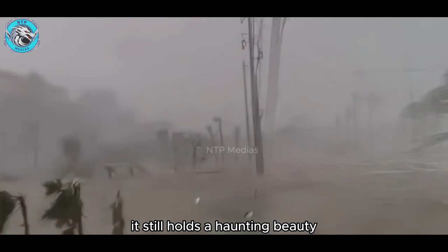As the flood season approached, the temporary dam at their construction site was not reinforced. When the flood hit, the impact of the current increased suddenly, and the temporary dam couldn't withstand it. Soon, the entire dam gave way, and the river flooded the construction site within minutes. Through the video, you can see several large pieces of equipment submerged. It's unclear if other critical water conservancy equipment is also affected, as the video doesn't show everything.